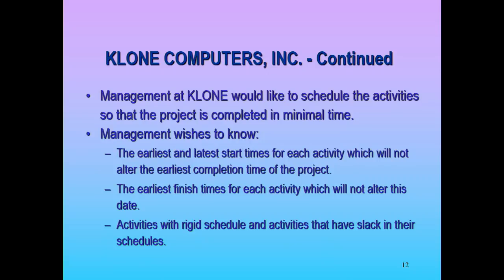So we're going to have 2 start times and 2 finish times. So let's define what those are. The early start time is the earliest, best case scenario, that an activity can start. The early finish time is the earliest, best case scenario under normal circumstances, it can finish. So we want to figure that out first.